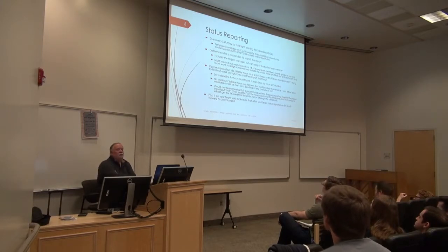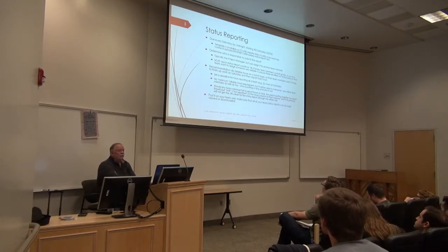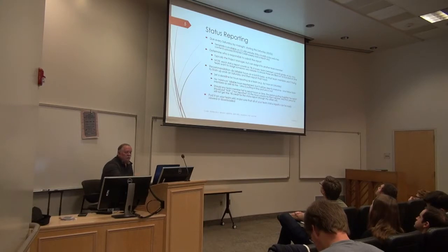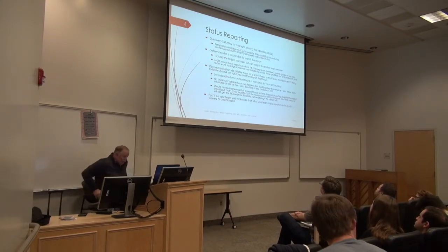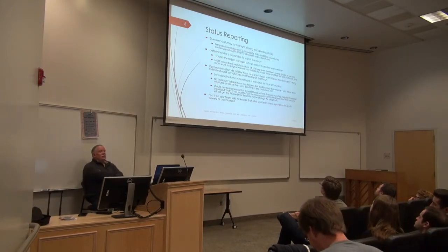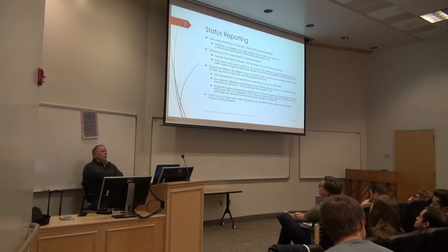Determine who's responsible. That's typically a project manager responsibility, but you can certainly delegate it. There's a recommendation you use billable hours on a Saturday through Friday basis, and post it on your team wiki so that we can look for it. I'm going to have Sean review all the status reports and compare week over week to see what has actually changed, because that's what the value of a status report is. Craig, what did you actually accomplish in the past week?